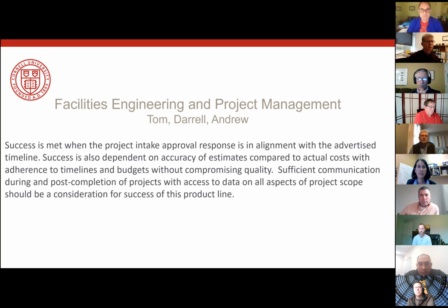I think it's going to be important, as we look at accuracy and what's the band around an estimate, to understand what that band of uncertainty is, and ideally it's getting smaller and smaller the more refined the design. Yep. I know when Jim Kasda was here, he despaired at actually communicating how good an estimate was at what point in time, and I think that is something we've got to continue to work on.